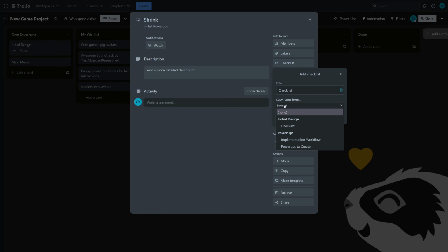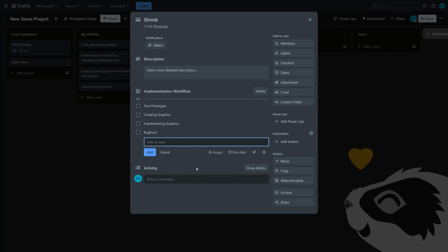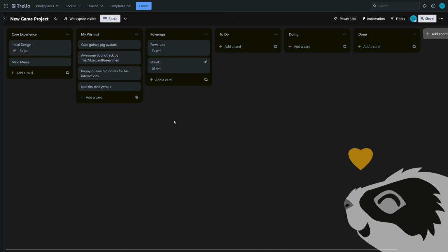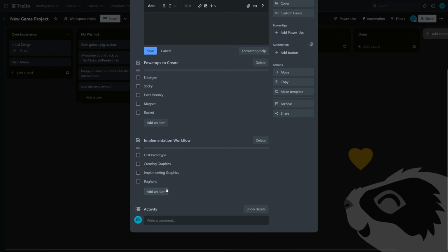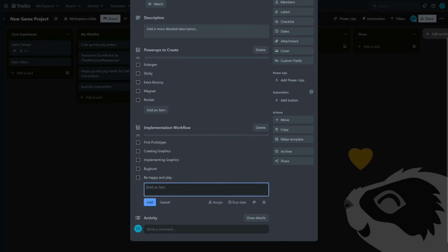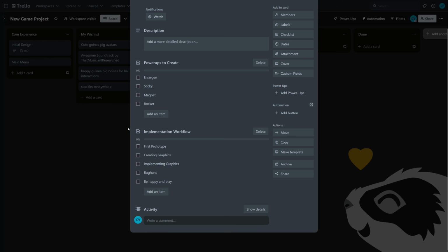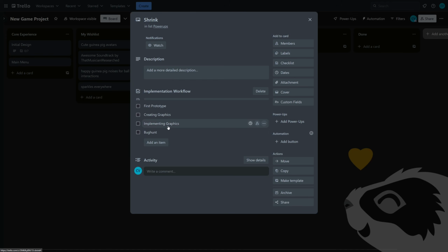It doesn't link them up, just creates a copy at the moment you added it to your card. This means that while you are working on your project and figure out which steps you actually need to repeat for multiple elements, you can update the initial list, and for every new card that gets created, they will grab the most current version of the list to add. Lists on cards you created prior to any changes on the main list won't be updated though.